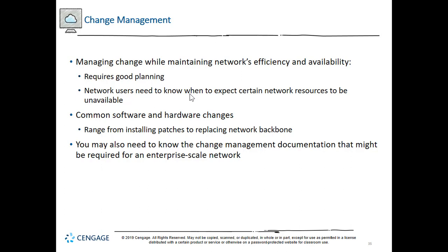So it is important when you create your agreements that you have what are also called assumptions. For example, the assumption is that the holes in the walls that we have to go through have already been put in, so we can just run our cables through them. Another assumption would be that when we go into the building, the ceiling grid will already be down, so that we don't have to tear down the ceiling grid. Think of the amount of added extra cost if you have to work inside of a ceiling that is already up.